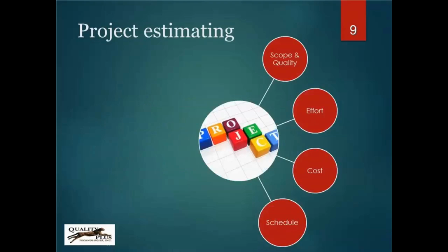So when we talk about project estimating, and I mentioned software development, that's where we're actually going to either start out with a legacy system and enhance it, or we start out with absolutely nothing, or we're replacing a system. So the biggest challenges we've got in terms of project estimating: we want to be able to estimate the scope and the quality. We want to be able to estimate the effort, and effort in software development is the primary cost driver. The amount of labor, the amount of effort that our human resources, our people, are putting in is typically the largest component in terms of cost.